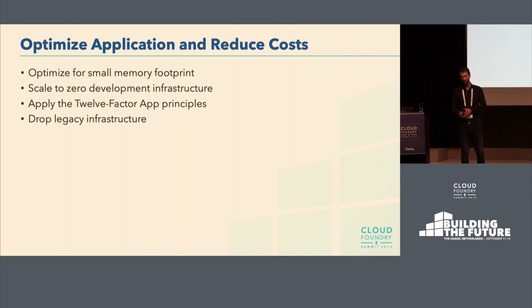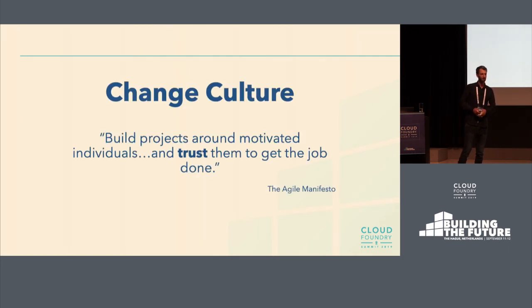Besides that, we still recommend to maybe keep the old infrastructure in place after the migration for a couple of weeks, just to make sure everything is fine, and then you can throw it away and fully focus on your new journey.